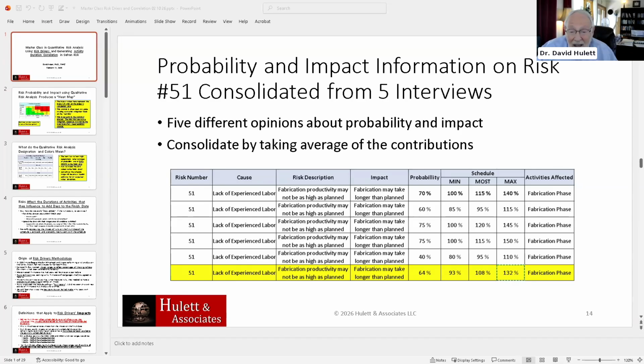Okay, now the second interviewee comes in. He doesn't even know who the first interviewee was, or he might. But I have tab number 2. Tab number 1 was interviewee number 1, and all the information that he gave is in tab number 1. Well, interviewee number 2 is going to see all the risks that were included, which means all the risk register risks if you want to talk about them, and everything that interviewee number 1 said, but he doesn't know who interviewee number 1 is.